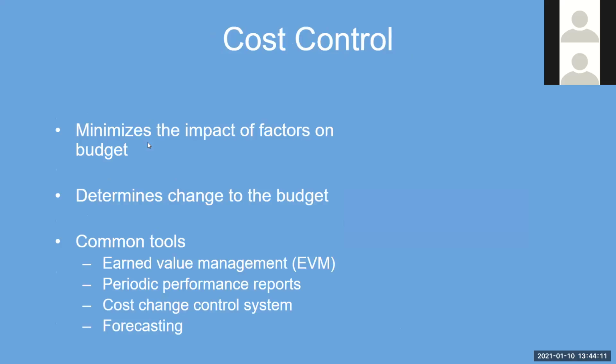All right. There's something important here I want to share. It's called earned value management. This is an advanced topic, but it's interesting. As you're working on your project, the project is earning some value through the work that the team is working on. So for example, think of it this way. You are working on a crisis line project plan. You put a plan together. The whole project, let's say, is valued or costs, hypothetically speaking, $1,000, and it's going to take, let's say, 10 months to do. And let's assume the team is working uniformly.